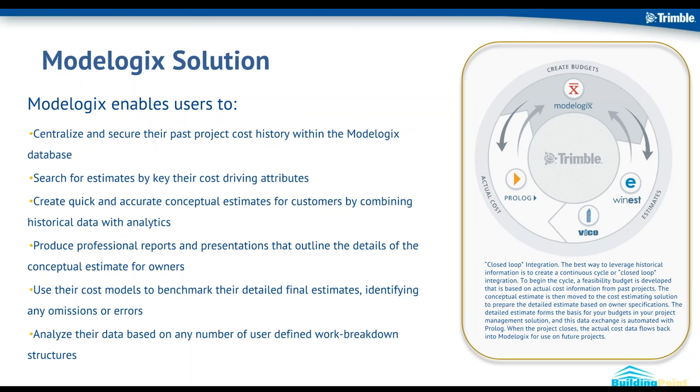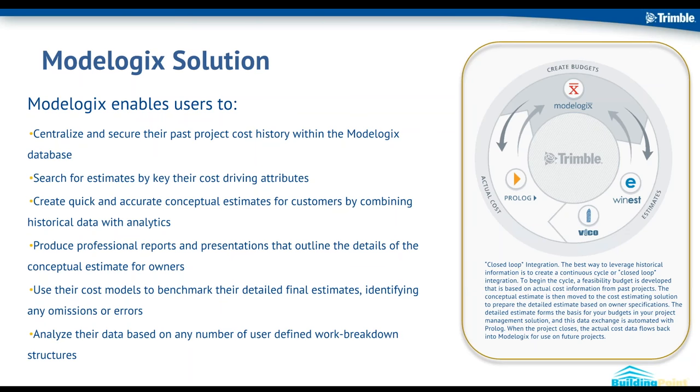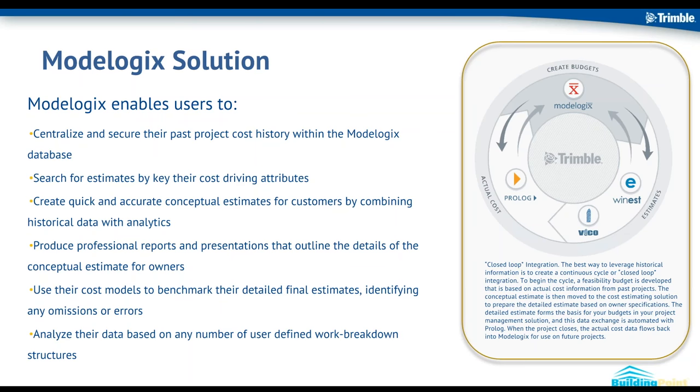From that, you can produce reports and presentations that outline the actual details of that conceptual budget. So you can work either via a report handout to the owner or kind of live in the software. You can work through that budget, show the comps for the other projects that were used to produce that budget, and you can kind of show your targets and where they line up and stack up compared to the past projects across all systems. You can use, and this was kind of a side use case that came out of the product, but it's actually used quite frequently - the ability to benchmark your GMP estimate or really any stage of the detailed estimate against your past projects. And then lastly, you can analyze your data based on any work breakdown structure you choose. So if you want to use CSI, you want to use Uniformat, you want to use your own company's kind of customized work breakdown structure, those can be all imported in the system.